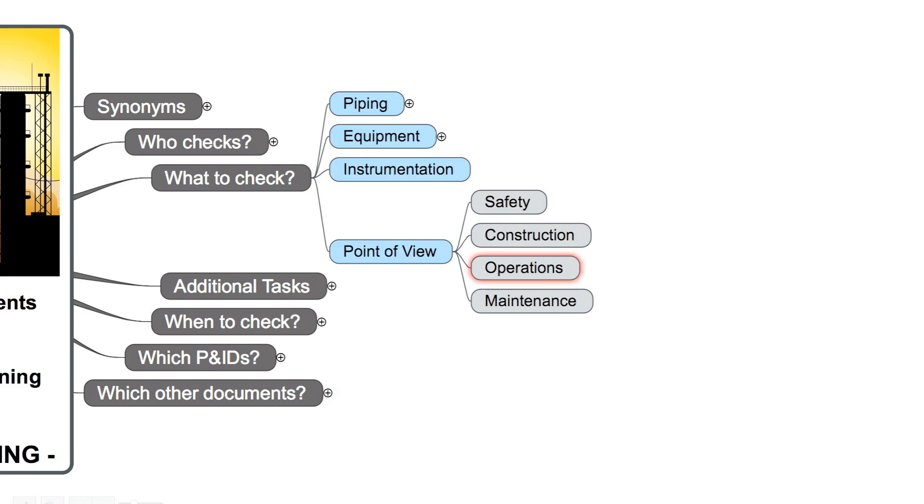Please observe the system from the point of view of an operator. Is it possible to operate this valve or do we need an additional platform? Write these findings down. The same is valid for maintenance works. Is there a hoist over this big motor and pump to remove it or do we have to build a complicated mechanism?